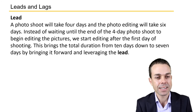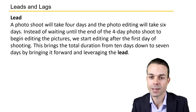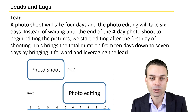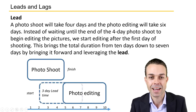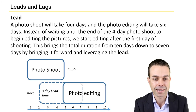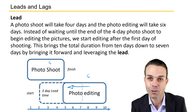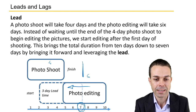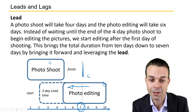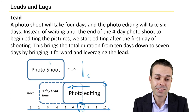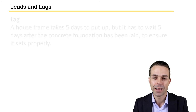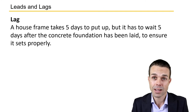Let's look at an example of lead time. A photo shoot takes four days and photo editing takes six days after that. Instead of waiting until the end of the four-day photo shoot to begin editing, we could start editing after the first day of shooting. So instead of 10 days total, we bring the photo editing forward — leading it forward — and our total time is now seven days. The two activities are done in parallel for a portion of those activities.